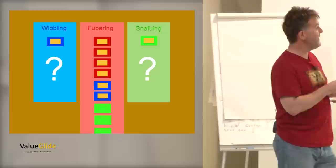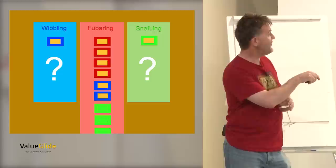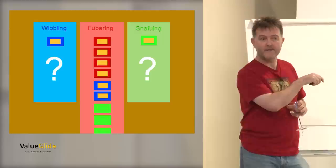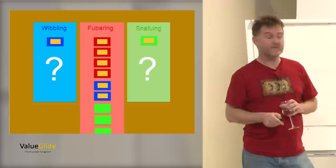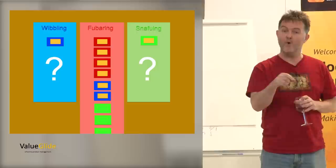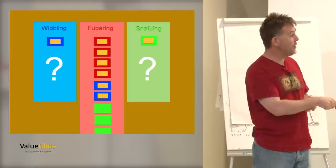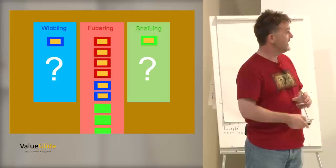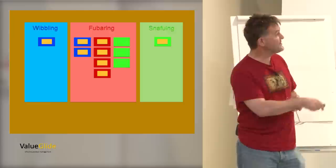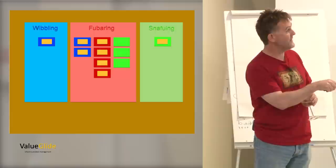And of course it's likely that these are going to happen in combination. So we have this kind of setup. Now I think this has something going for it, because on a classical Kanban board, if the blue team was working faster than the red team, the blue team would have all of its pieces of work, its stories, collecting up here on the right-hand side. But that's not where the problem is. The problem is the combination of the red team and the blue team. It's not the blue team. It's not the red team. It's the relationship between the red team and the blue team. They're not working at the same rate. And this, I think, again, clearly visualizes that, because we have blue things in the red column, indicating it's the nature of the relationship.